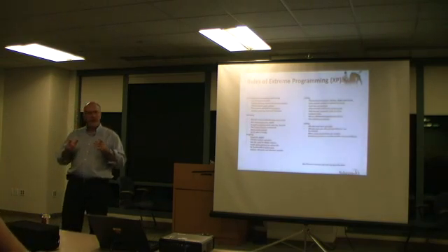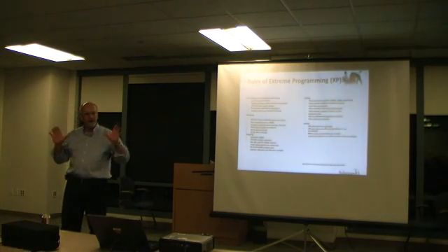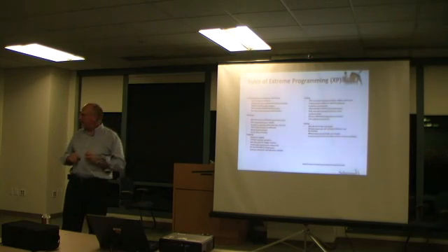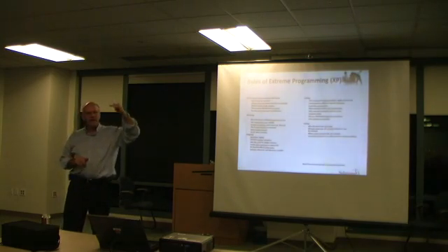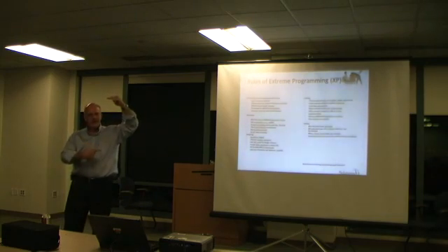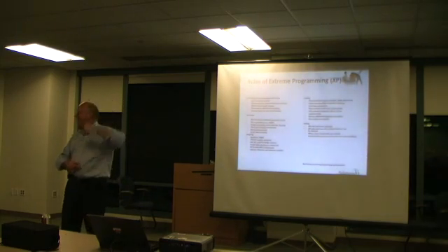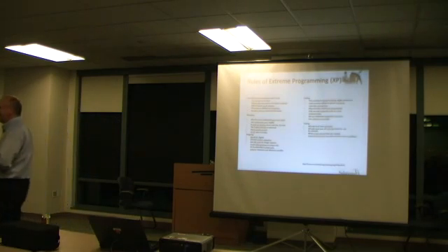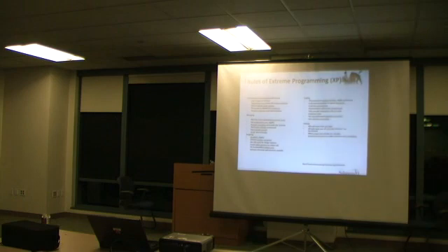By the way, a good rule of thumb that I heard that was kind of an aha for me. Guys had standard tasking, and they said the first task on every story was confirm the acceptance criteria for the story. It was kind of cool. And the last one was check to see if I met the criteria. And the acceptance criteria should be with the business guy who created the story and QA. Yeah, it was an interesting one that I'd honestly not thought of. It's a standard task.